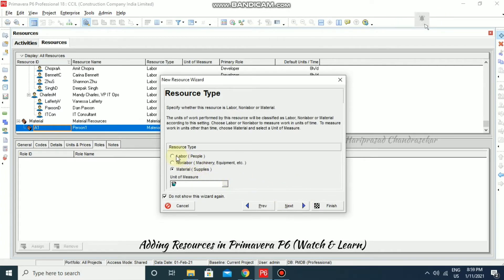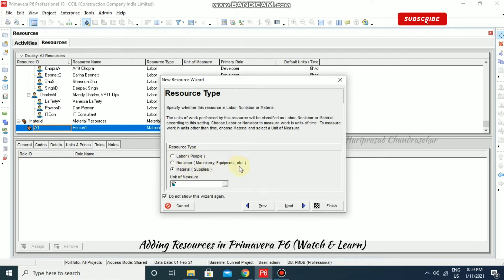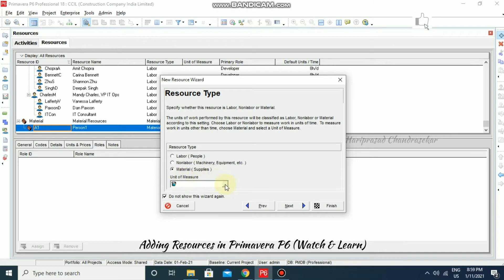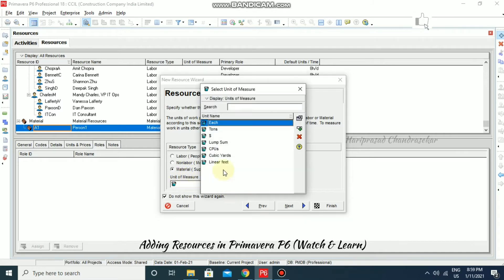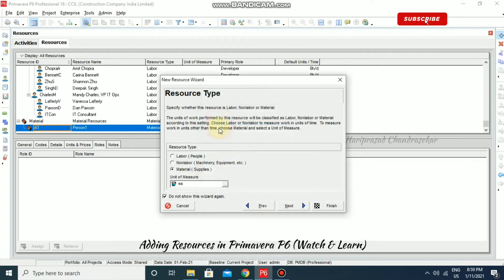Here you can select Labor, Non-Labor, or Material. We have three options: labor means people, non-labor means machinery and equipment, and material means supplies. If it is material, you can input units of measure — for example, I'm putting 'each'.